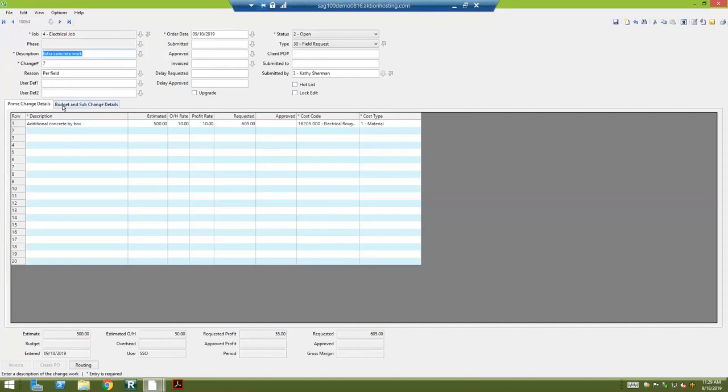The second tab is going to change our budgeted line item or subcontract. If you had a subcontract and you needed to change the subcontract agreement line item, you could do that in the second tab.